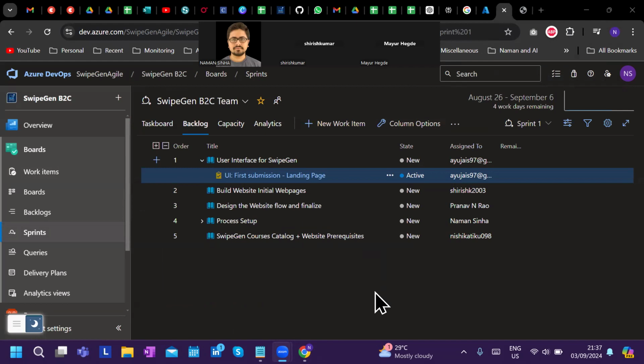So now you understand why it's very important, right? You are tracking people's leaves, you know their availability, you can plan deliverables better. As a product owner, let's say I have somebody who's above me, I have to update them that for the next 15 days my developers are not available, we cannot do a lot of work. There are holidays and everything. You plan better, you estimate better, you have a lot of transparency between you and the client, and things are pretty smooth. You can go back 10 sprints and see what was done that time, why we couldn't accomplish something, and if somebody implemented it in a way, how they implemented it. So everything is documented.